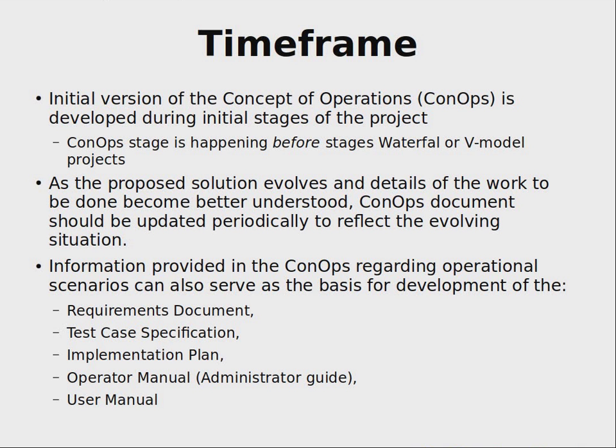And as I told you, in the time frame, concepts of operation or feasibility study, which is documented as a concept of operation, happens before waterfall or V-model projects. So these two methodologies or frameworks ignore this stage when you are not developing anything, you are just analyzing whether you need to develop anything or change or whatever.